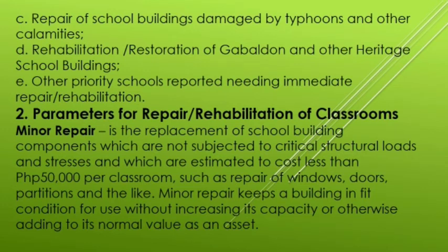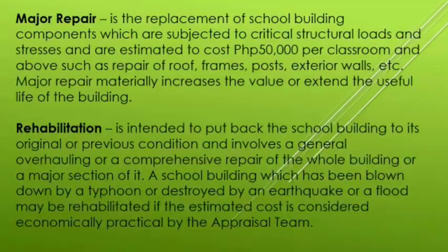So let us now define the minor repair. It is the replacement of school building components which are not subjected to critical structural loads and stresses and which are estimated to cost less than 50,000 pesos per classroom, such as repair of windows, doors, partitions, and the like. So minor repair keeps a building in fit condition for use without increasing its capacity or otherwise adding to its normal value as an asset. That is for the minor repair, and let us have the major repair.